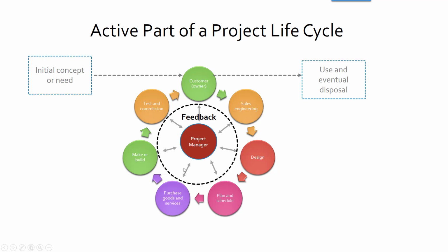So purchase goods and services, then you can make or build. From there, you test and commission, and then you give it to the customer. And at any point of here, you may have to back up because something isn't right, or doesn't meet the expectation of the owner. Once you get a successful outcome, you're going to use it, and then at some point it's going to be disposed, right?